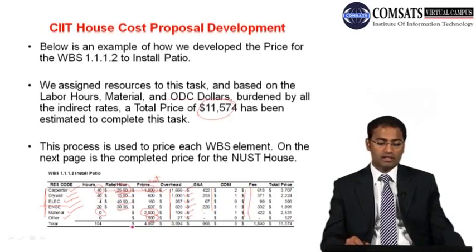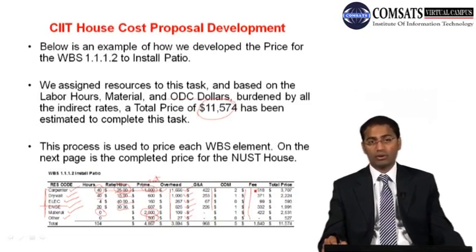So over there you can see you have totals in this row, and you are calculating how much fees you will charge. So if you are paying your carpenter $1,000 and you are spending $1,666 as overheads and $422 as G&A, and then $2 for com, then the fee you are planning to charge the client for this resource is 618.